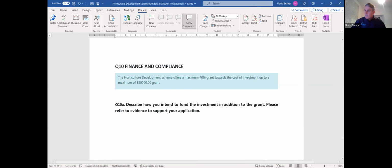Okay. Next question: can you claim the grant payment in stages, or do you have to complete the project entirely? No, I see no reason. Most other grants you can claim in stages. There's nothing saying here you can't. Bearing in mind they said they want the project done within a year, but if you've got a 6-month project and you want to do 2 quarterly claims, I see no reason why you can't do that.